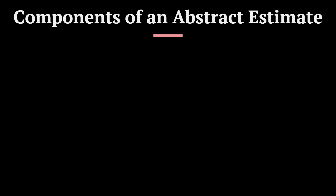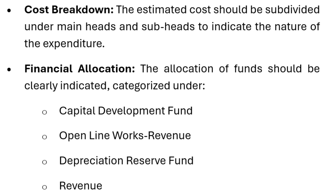Components of an abstract estimate: The abstract estimate should include the following key components. First, a brief report and justification — a short explanation of the need for the project and its significance. Second, specifications — basic details regarding the materials and standards to be used. Third, fund requirements — a statement on whether funds are needed in the current financial year and the extent of the requirement. Fourth, cost breakdown — the estimated cost subdivided under main heads and sub-heads to indicate the nature of the expenditure.